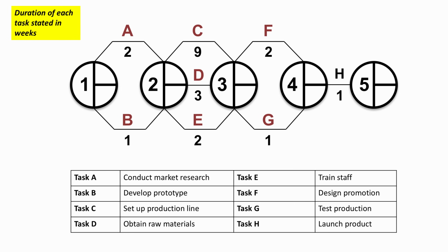So clearly the start of the network is 0. Now the next node, node 2, well we're working earlier start times here. We always take the highest figure. So we can wait a week for B to finish because we have to wait 2 for A to be finished. So the critical path is trying to find the longest path here. So the earliest start time that we can start C, D and E must be 2. We have to wait for A to finish.